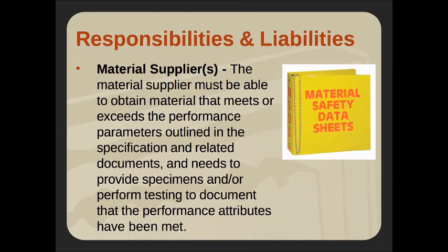Material suppliers. It's up to the material supplier to be able to obtain the material that meets or exceeds the parameters outlined in the specifications, and any related documents that are required, any specimens, any samples, and in many cases, the testing data that's needed to substantiate it.